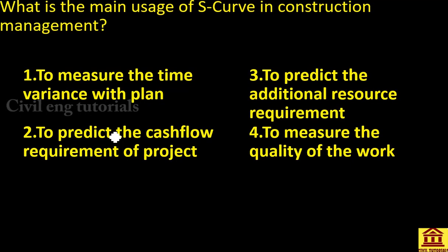To define the S-curve concept, S-curve is mainly used in cash flow analysis. It can be used for both the contractor side or consultant side. So let me define: the S-curve is a graphical representation of how the project budget will be spent if work is carried out exactly as estimated and scheduled.